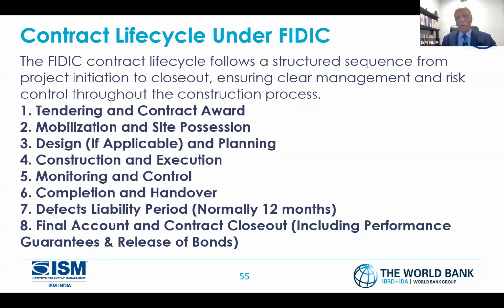The cycle is not complete. Defects liability, let's say over 12 months. Somebody says, no, I need it for 2 years, 24 months. You could do it. Final accounts and contract closeout. That's where we come. And at that stage, I give my release of bonds. So from the beginning of tendering till I give the release of bond, the whole life cycle, including the defects liability period, FIDIC covers.